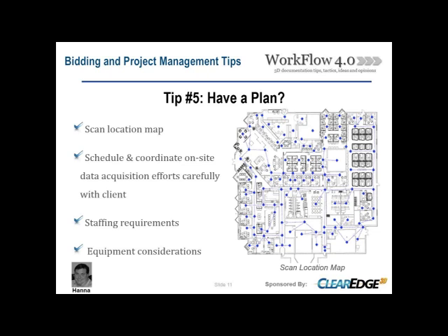Again, now we're working very, very closely with the client as we're creating our bid, determining what areas of the building we can get into and get out of at specific times, working hours. What about neighboring buildings? Do we have access to those to get line of sight? Those are a lot of things that you're going to be faced with trying to understand, because once you bid that job, you'll need these considerations to put into place so that you can successfully get through that project. And without having a plan is going to really impede you.